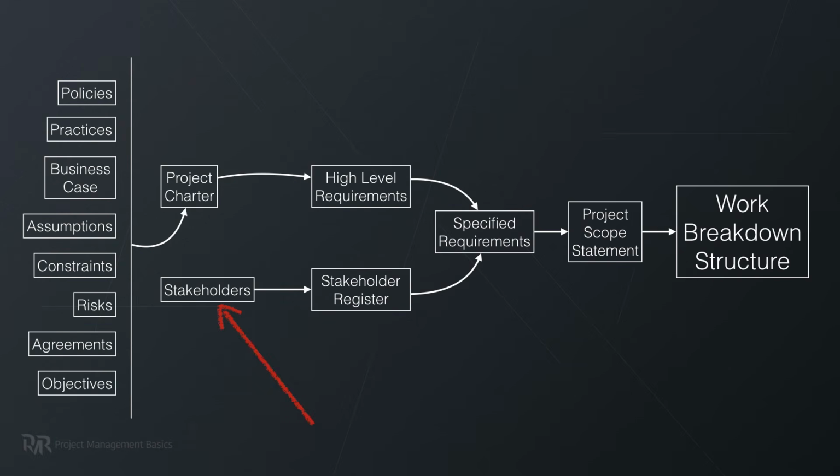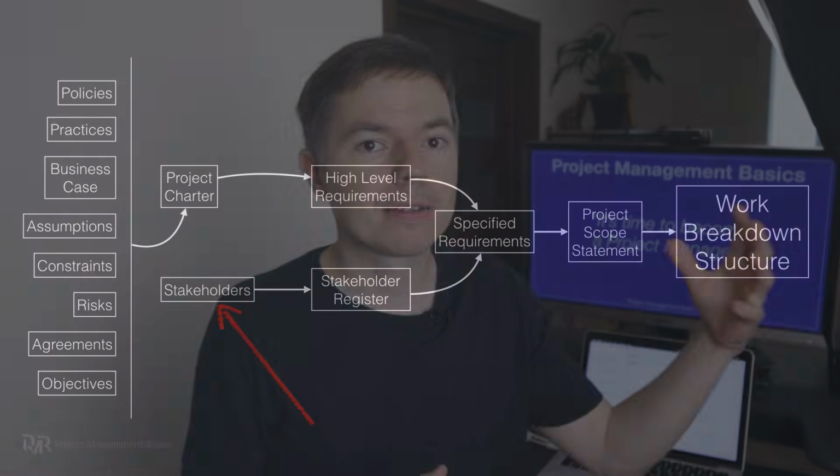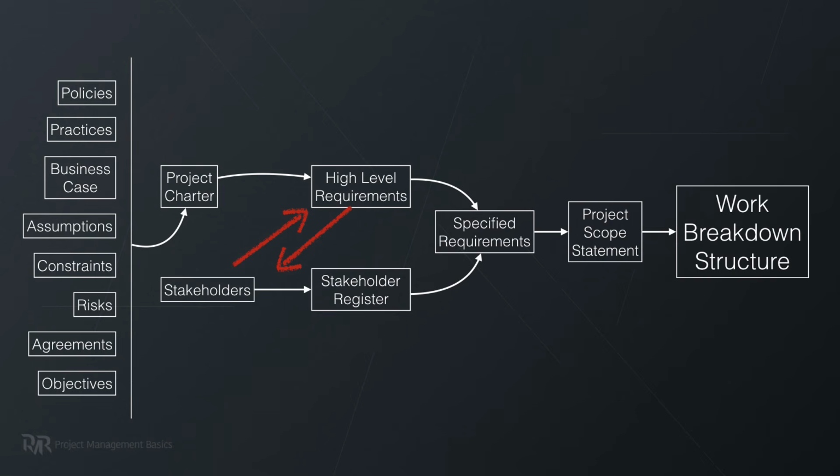Then we find relevant project stakeholders who have expertise and authority to provide specific requirements. First, your clients provide the main requirements, then you collect relevant requirements from your team and subject matter experts within your organization. Together, you work to define detailed requirements. If needed, you create a requirements traceability matrix.